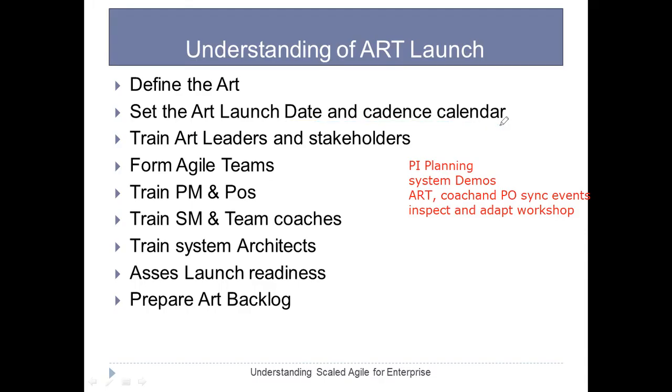At the same time, when it comes to in-person planning, this advance notice reduces the travel and the cost for remote or hybrid planning, which majorly helps to ensure most stakeholders will be able to participate, so that once the calendar is set, the team events can also be scheduled, with each team defining the time and place of their events, including team planning, demos, retrospectives. All these will be taken into consideration so that all the teams on the train use the same iteration start and end dates, facilitating synchronization across the ART.